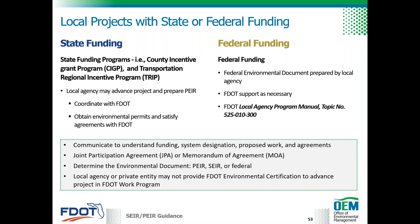For more information on LAP, see FDOT's Local Agency Program manual available on FDOT's procedural document library website. A thorough understanding of funding sources, system designation, proposed work activity, and existing or proposed agreements — such as a joint participation agreement or memorandum of agreement — assists in determining if the project should advance as a PEER, a SEER, or as a federal environmental document. A private or local entity may not provide FDOT environmental certification to advance a project in the work program, and FDOT should not provide certification to a private or local entity.